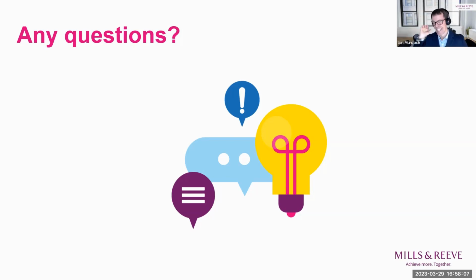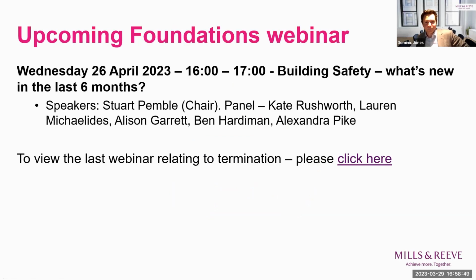Very good, thank you. There's a nice concluding comment in the Q&A box, actually, which says the advice from our head of legal is to avoid termination if at all possible. That probably is consistent with the remarks that we've made. It's often referred to as the nuclear option, and there are circumstances where it can't be avoided, and in those circumstances, make sure that you're very clear on the grounds, and you follow the procedural requirements as closely as possible. So I think that concludes the discussion on the Q&A.